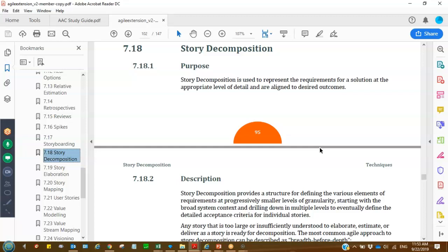I've seen this in terms of architectural kinds of things where if you're building a house, you basically have the foundation, your outside framework, your plumbing, your electricity, some of the architectural niceties, your landscaping, and all of that goes together in sort of one line to produce a house. But for each of those things, you could drill into it and say, okay, now I want to pull the heating system apart and say, what are the components of the heating system that I have to deal with?